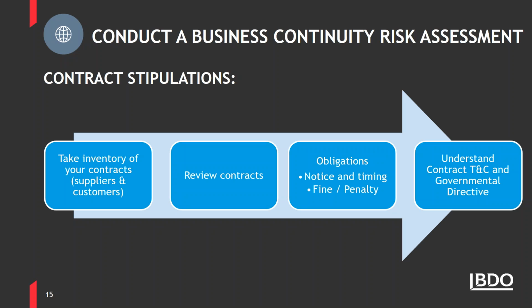The key thing to understand is what contracts you do have in place and which need to be taken action on. So our guidance would be to review those contracts, understand what your organization's responsibility and risk is for the conduct of subcontractors and suppliers. If any of them suspend or terminate their subcontract, what are the risks to the whole project? Will it fall like a stack of cards, or do you have plans in place to mitigate the impact?